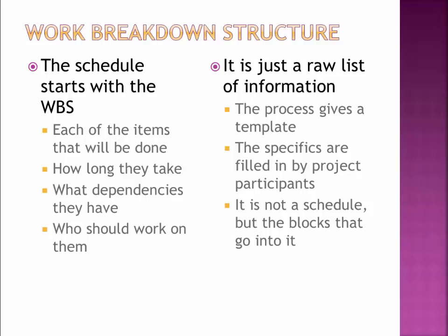Much like we talked about functional decomposition, we do something very similar in the tasks of getting the work done. We want to get to the item of what's going to get done. Eventually, we're going to say how long it's going to take. We're going to say what the order of these things is. I can't start test cases until I finish requirements. Those have to be done first. I might have certain test cases I can't do until the design is finished, particularly performance test cases. So I can't schedule those to start at a particular time.